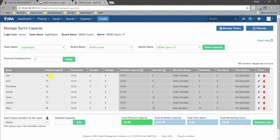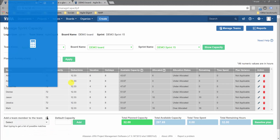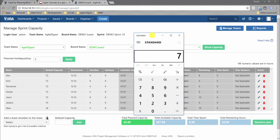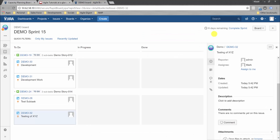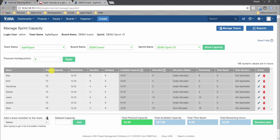To verify: 72 minus 12.33 minus 8 minus 8 equals 43.67. But as the sprint progresses with days remaining, the tool still shows the original 43.67 rather than recalculating from today. This add-on has improvement opportunities — ideally it would show current remaining capacity as of today so teams can track over- or under-allocation throughout sprint execution.